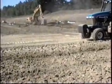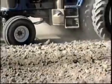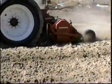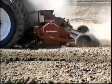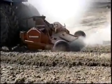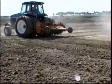This is a construction site in Rochester, Minnesota in July of 2002. What was unusual in this situation was that they'd had the wettest May on record and the second wettest June. The construction project was falling way behind and they felt they could not wait any longer for natural drying to occur — they had to stabilize the soil to get back on schedule.